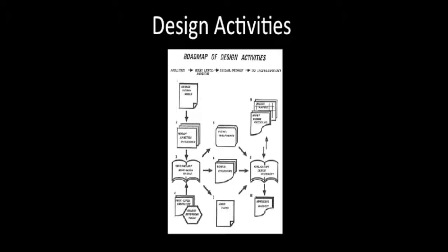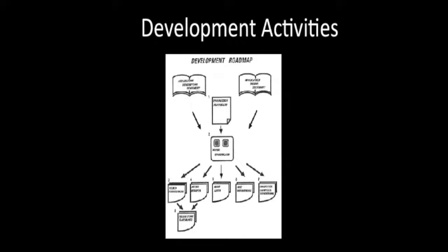During the design phase, the application description document is reviewed and details added to it. Then the more fully developed application description document becomes the design document. The design document includes a high-level design and a plan for the entire multimedia project. The project manager breaks down the project into manageable sub-projects. Finally, the design team evaluates the design plans, which are the deliverables of the design phase.